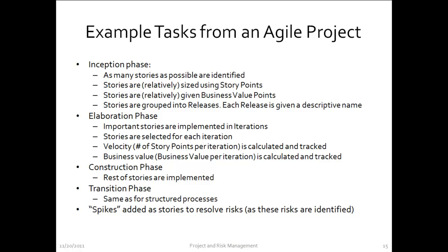One term not introduced earlier is a spike. A spike is a story added not by the customer, but by the development team because of a perceived risk. For example, if a developer hasn't figured out how floating point calculation works in C++, and that's critical to the system's actuarial analysis for an insurance application, a technical spike would be added to investigate the accuracy of floating point calculation in C++. A tech spike has no business value — it's added by a developer to resolve a risk.